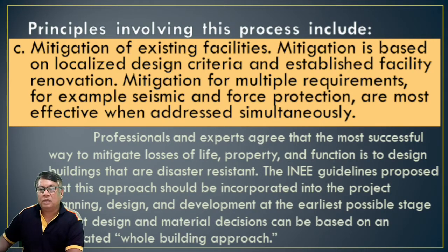The INEE guidelines propose that this approach should be incorporated into the project planning, design, and development at the earliest possible stage, so that design and material decisions can be based on the integrated whole building approach. So all this risk reduction plan or activity should be implemented as the planning period of the project starts.